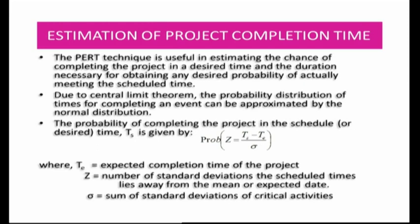The probability of completing the project by the scheduled time t_s is given by P(z), where z = (t_s - t_e) / sigma. Here, t_e is the expected completion time of the project, z is the number of standard deviations the scheduled time lies away from the mean, and sigma is the sum of standard deviations of all critical activities.